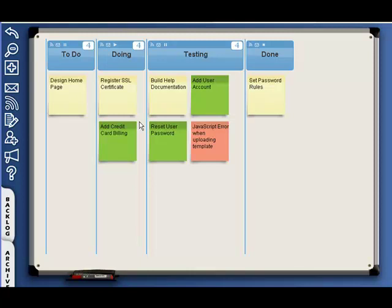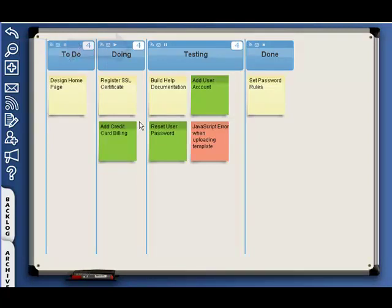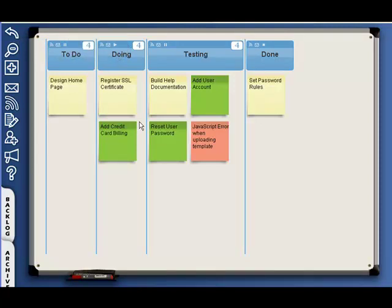LeanKit Kanban helps you prevent these bottlenecks by setting work and process limits. In this example, we have set work and process limits in all of our working lanes at four.